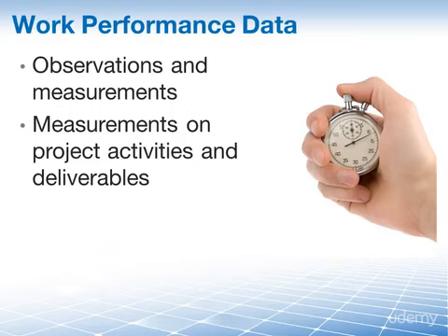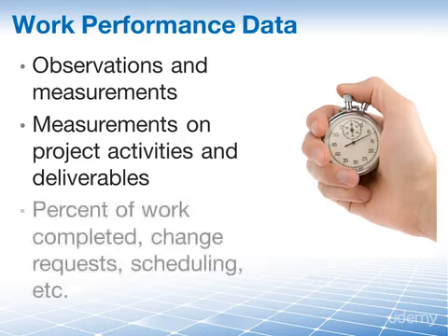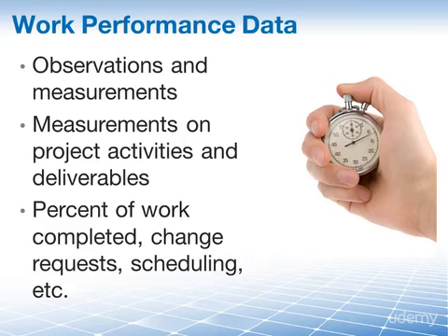Or how will you communicate schedule information? This input also contains information like the reported percentage of work completed, technical performance measures, start and finish dates of schedule activities, number of change requests, number of defects, actual costs and duration, and so on. Do you think that stakeholders are interested in this information? Of course they are. Without defect information, how will you know that your project is in control? Without cost and duration information, how will you or your stakeholders know that your project is on track?